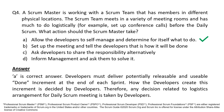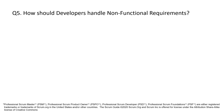Developers must deliver a potentially releasable and usable done increment at the end of each Sprint. How the developers create this increment is decided by developers. Therefore, any decision related to logistics arrangement for the Daily Scrum meeting is taken by developers.